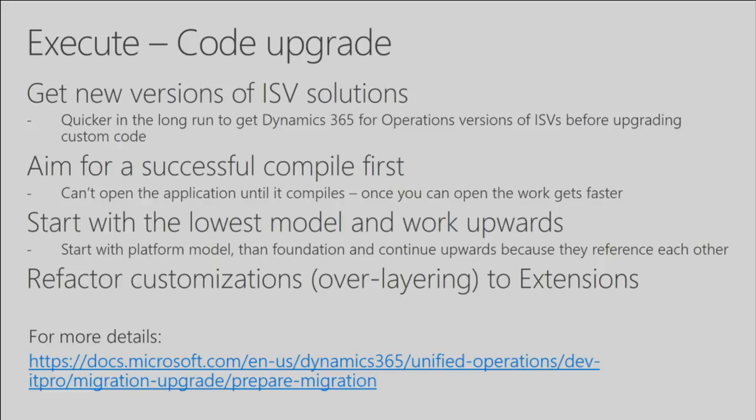And at the end, you can refactor customizations to extensions. We still support overlaying, as I said. So this is a part of your project that you might decide to do in phase 2 if you want to reduce the initial upgrade cost. But you could also do it from the beginning as well.